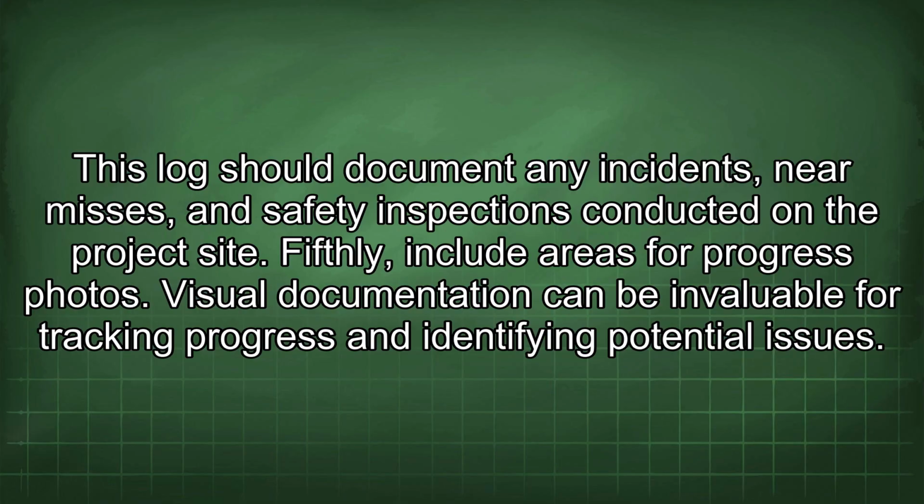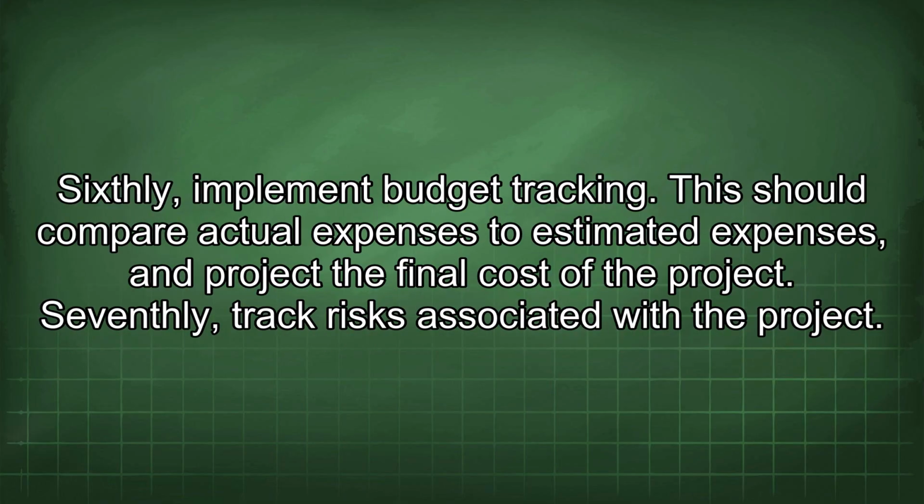Fifthly, include areas for progress photos. Visual documentation can be invaluable for tracking progress and identifying potential issues. Sixthly, implement budget tracking. This should compare actual expenses to estimated expenses and project the final cost of the project.